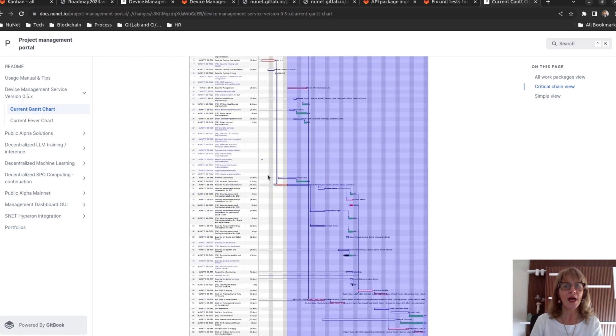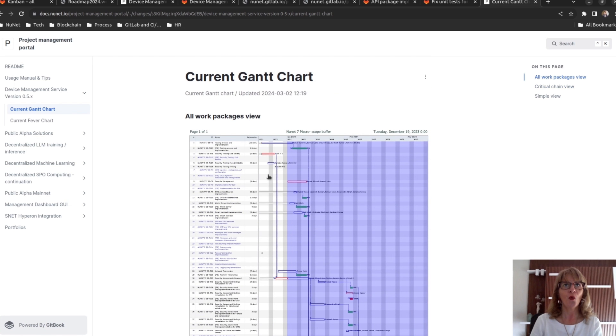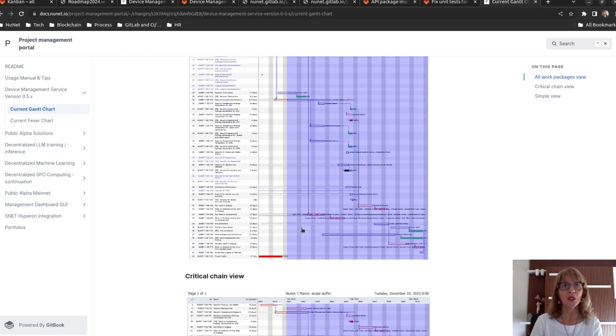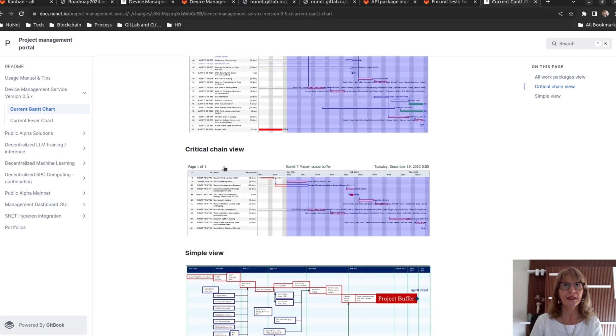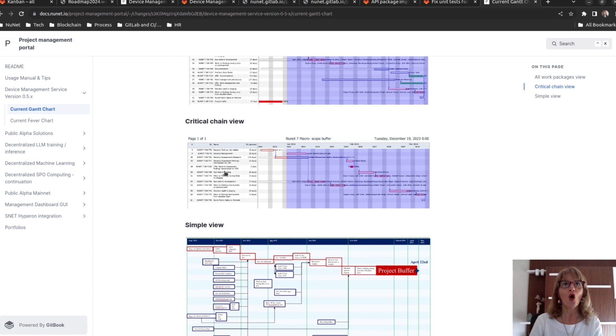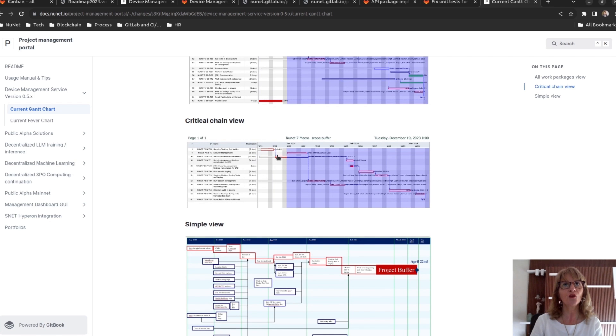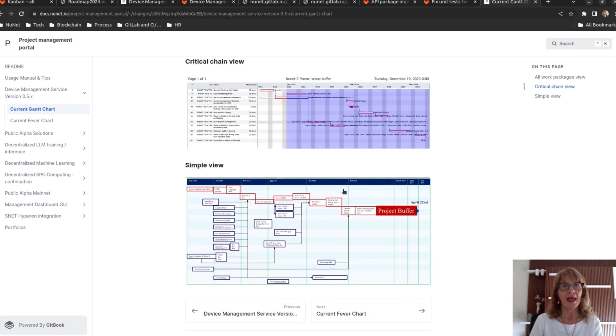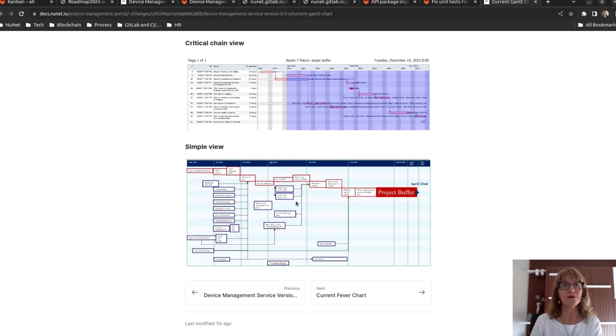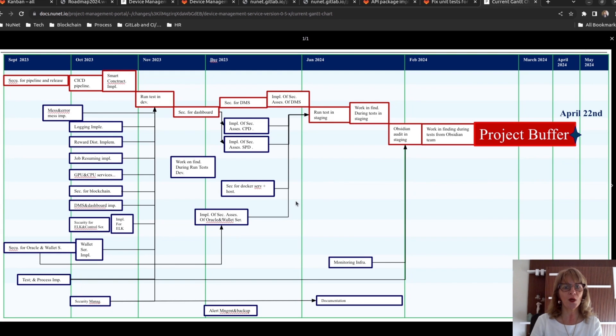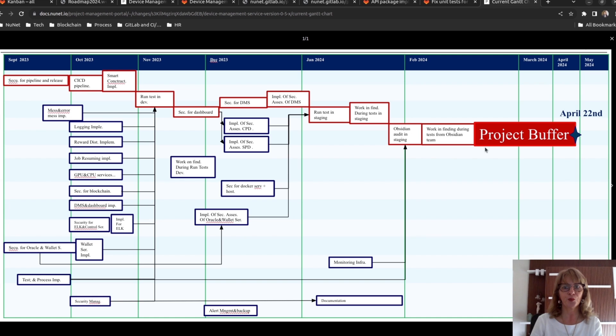We used three Gantt chart views. One with all the work packages. One with only the work packages in the critical chain.